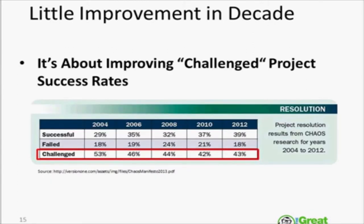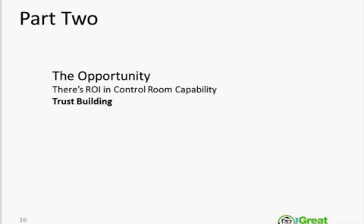Unfortunately, as an industry — IT in particular — we have not really developed a very good track record of success. Failed projects are still almost 20 percent, and challenged projects are still almost half. So year after year, our customers have reinforced in their minds the fact that we are not necessarily going to deliver, and they don't like finding out at the last minute. This webinar is really about how we deal with early warning signs so that our customers can feel confident that either they're going to get what they expect, or if they're not, they know early enough to reset expectations.